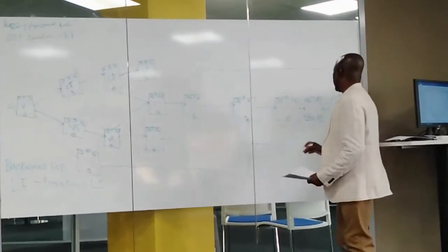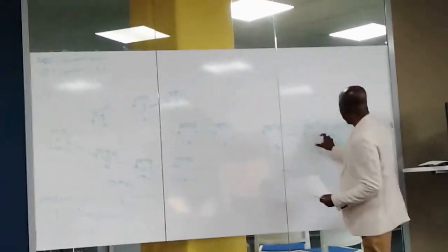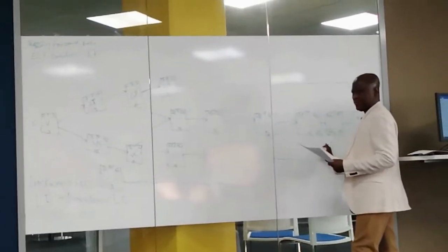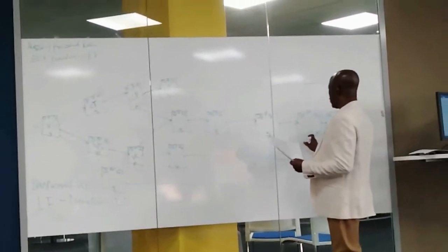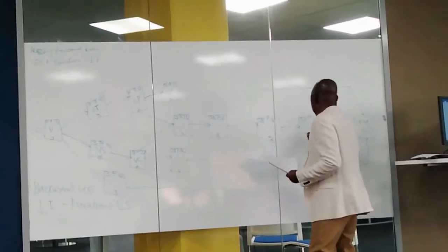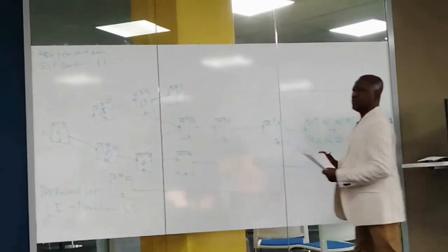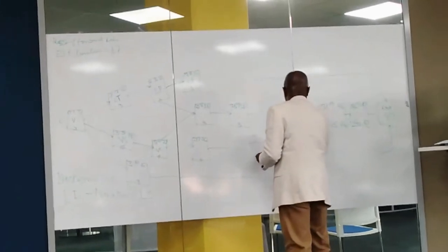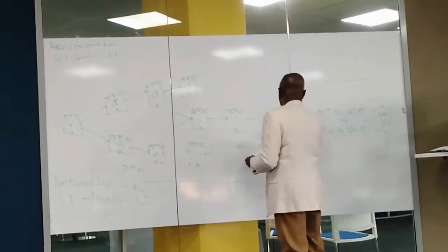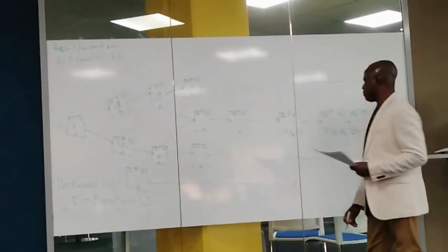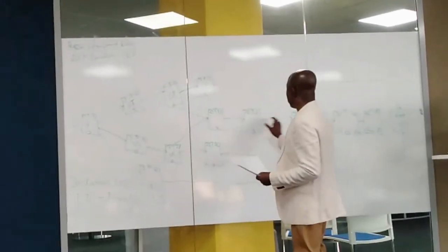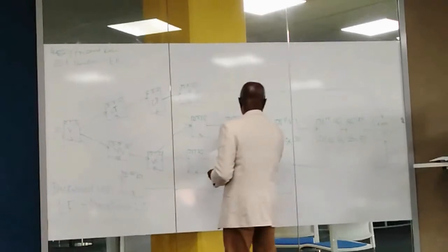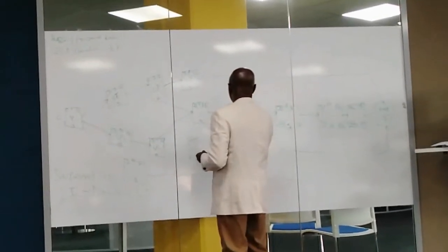So that's 46. Now, because this is dependent on this, 46 will come down here. When we get here, 46 minus 15 is equal to 31. Same on the top. Now, this is dependent on this. So we bring our 31 here. Minus 3, we're going to have 28. Am I making sense? Yeah. This is still easy because this is dependent on this. We carry our 28 down here and we minus 3. We have 25.